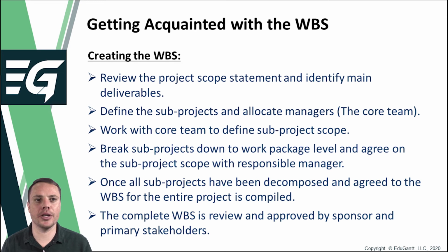Once the project manager and the core team member responsible for managing the sub-project reach agreement regarding the scope of the sub-project, the primary responsibility for further planning and works execution is delegated to the sub-project manager, who will regularly report to the project manager and present his or her future plans relating to project aspects such as cost, time, quality and so on to the project manager for approval prior to moving on to the subsequent tasks.